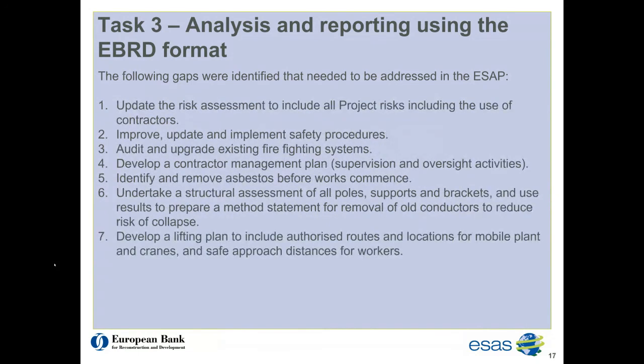Alan, please take us through the findings in relation to PR4. The risk assessment needs to be updated to include all project risks, including the use of contractors unfamiliar with the site. Safety procedures need to be improved and updated to reflect current good international practice and effectively implemented. The suitability of existing firefighting systems must be audited, assessed, and upgraded and maintained as necessary, given the requirements of the new infrastructure to be installed.